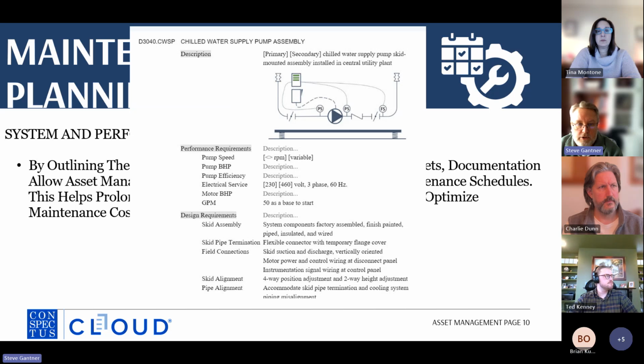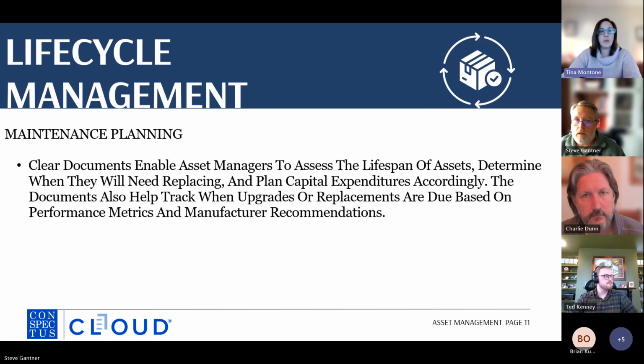You can track it on purchase orders. You can track it through the actual specifications. You can track it through commissioning, manufacturing. You want them to include that number on everything so that there's a consistent trail and a record of what was done, when it was done, and why it was done. Yep, all the way through to when you have the maintenance folks using it. Yes. So life cycle cost must be considered as the project is designed.